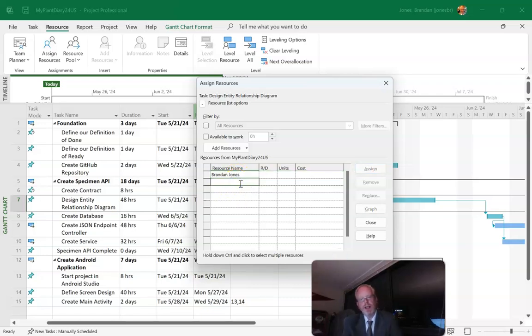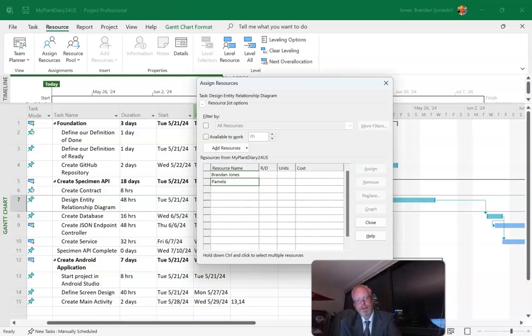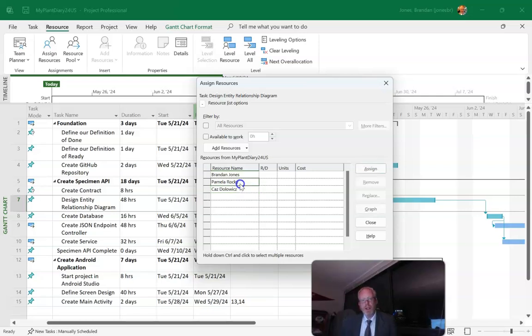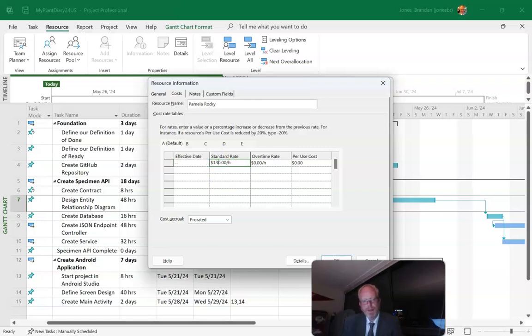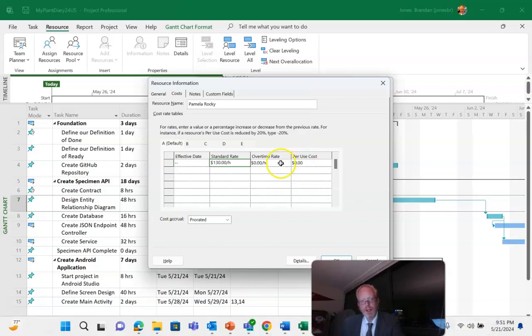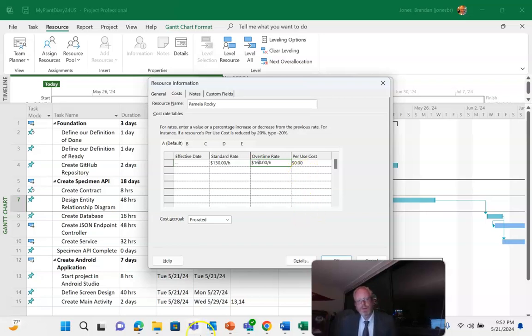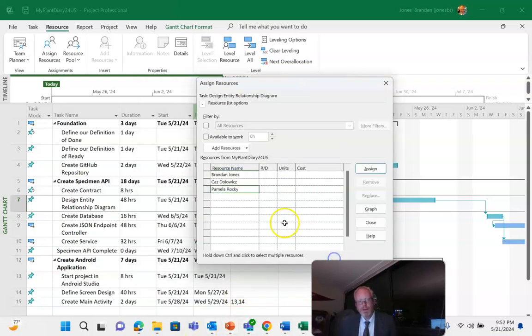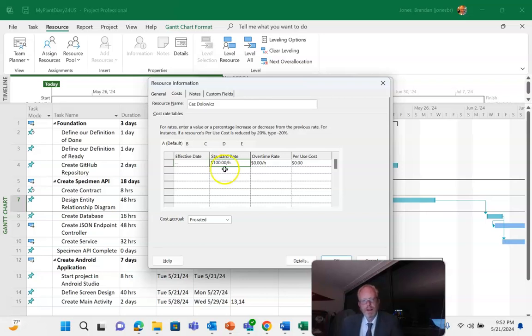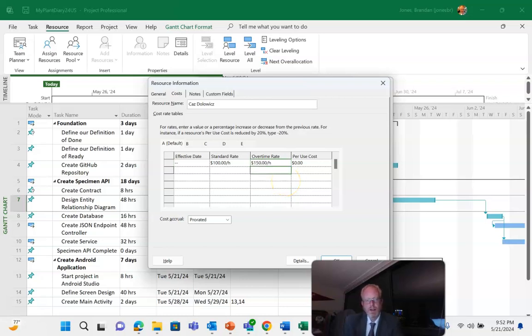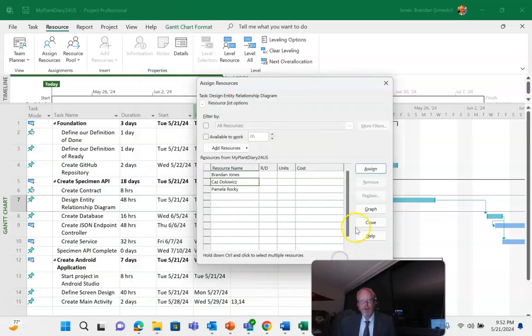Now let's go ahead and add Pamela Rocky and Kaz Dolowitz, and for each of these I can go in. I can set their rate as well. We'll say Pam is $130 per standard and $160 overtime, and let's say Kaz Dolowitz is maybe $100 standard and $150 overtime. Okay, now we can assign these resources to a task.